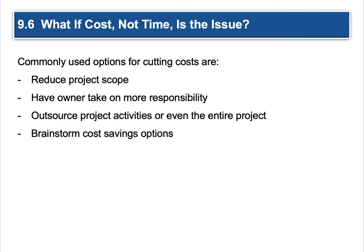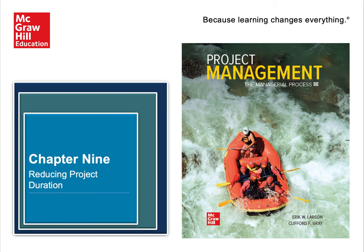What if costs, not time, is the issue? Commonly used options for cutting costs include reducing the project scope — we've talked about that. Have an owner take on more responsibility — have someone you're already paying a salary to do more, though you can overwork your people. Outsource project activities or even the entire project; find somebody with a more competitive advantage. And brainstorm ways to have cost savings — at some point near the end, have a spirited discussion with your team about whether there are ways to make this more efficient. I give points for clever. Reducing your project duration helps direct costs and gives your project a higher likelihood of being approved. That's a very quick look at Chapter 9, reducing project duration. It does not replace the reading, so make sure you're getting on that.